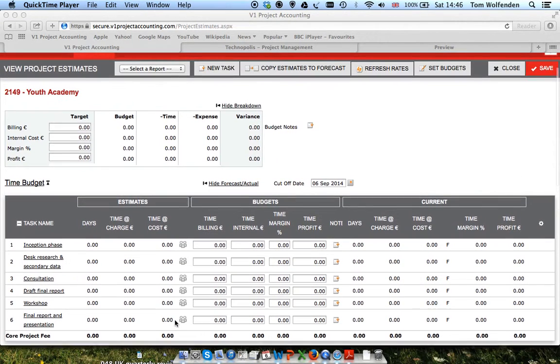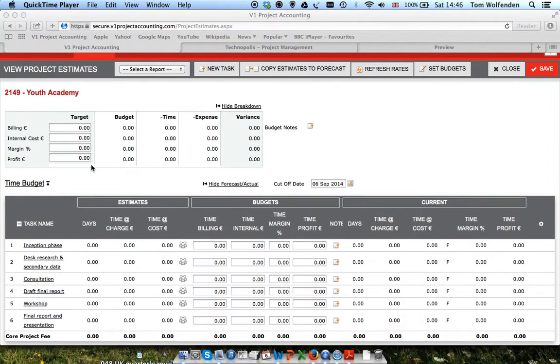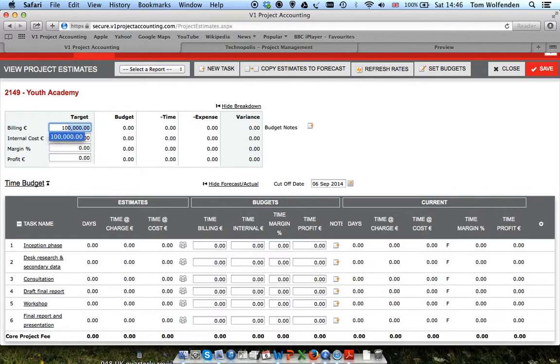information in here. Finally, you can also see that there is actually a target box that you yourself as the project manager can populate. So you'd enter the value of the project, and typically we're looking at, given our overhead cost structure, to generate a 30% margin on the work that we do, and this will then, once you've entered that information, give the margin and the costs.